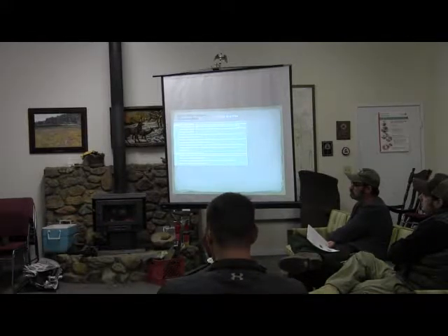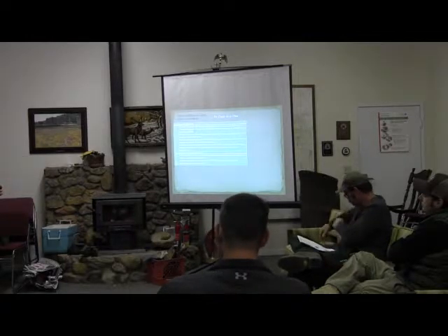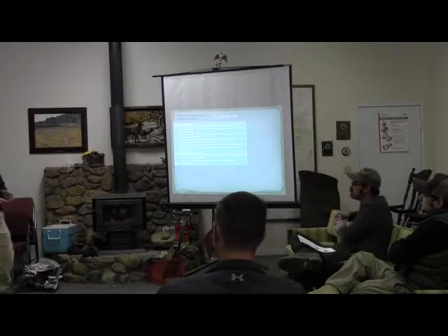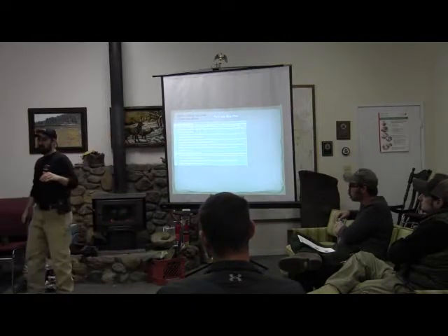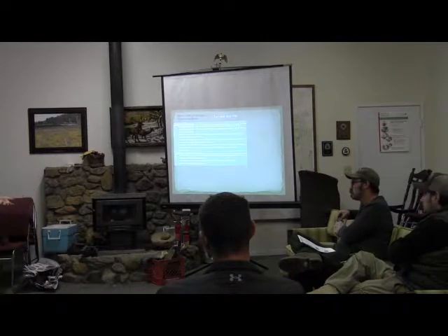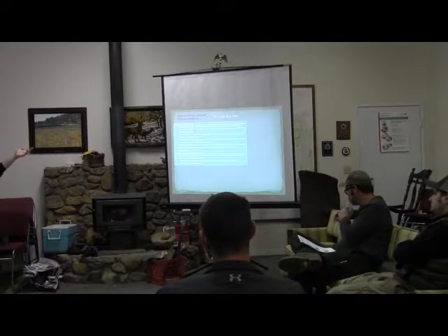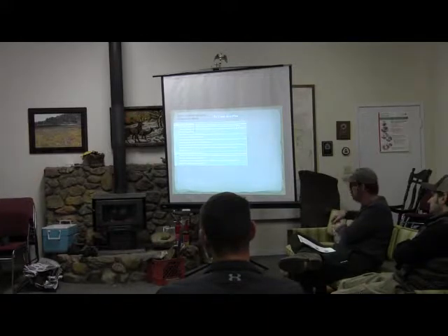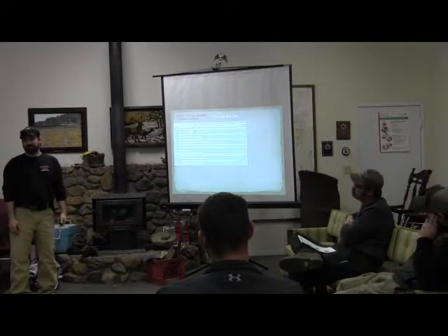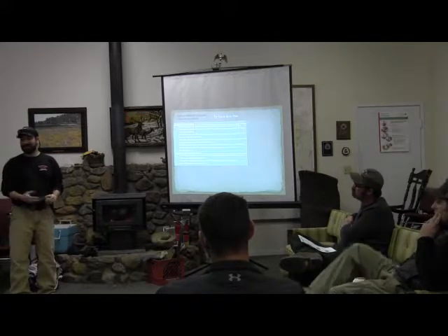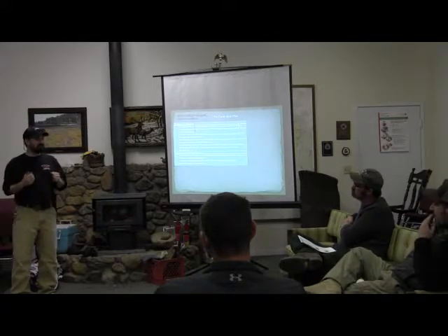This is where, like 2 years before the burn, when they're writing the NEPA, you as a project manager can say, hey, this is a good objective, can you put some numbers on there? Can we put a percentage on there? Because those are much easier for us to measure from a monitoring standpoint. Right now it's pretty easy: is there a duff layer or not? If you guys are comfortable with that, if it's 10 inches of duff, we can burn 9 inches of it off and still meet that objective. You've got to think about this stuff.